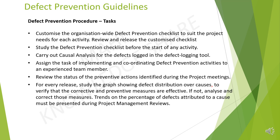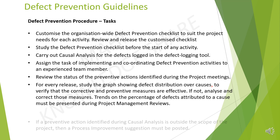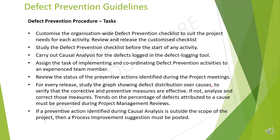For every release, study the graph showing the defect distribution over causes, to verify that the corrective and preventive measures are effective. If not, analyze and correct those measures. Trends on the percentage of defects attributed to a cause must be presented during project management reviews. And finally, if a preventive action identified during causal analysis is outside the scope of the project, then a process improvement suggestion must be posted.